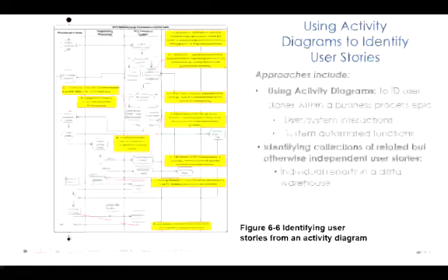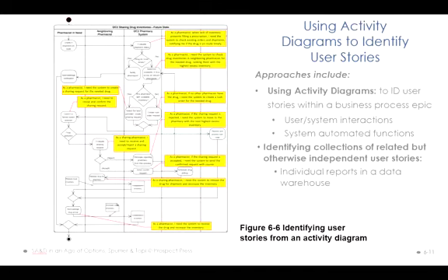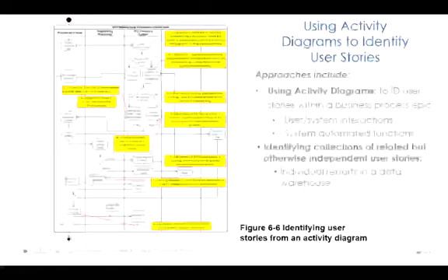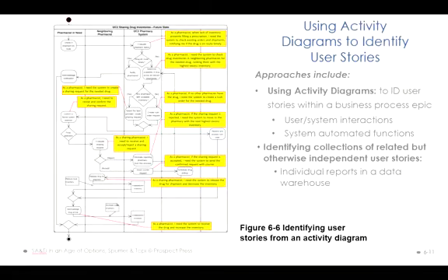And I keep saying a day or a week because that's the human cycle of completing a job. So typically we try to divide or modularize your software project into smaller tasks, and each one of these programming, website building or purchasing projects can be completed in a day, a week, or no more than a month usually.